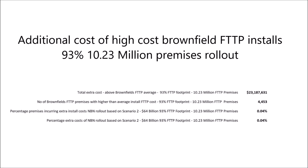The multi-technology mix NBN rollout is currently $21.5 billion over budget. The original budget, that is, of $29.5 billion. That's 73% over budget. The NBN should, in my opinion, publish a much longer list so more analysis can be done, because 70 just isn't enough.